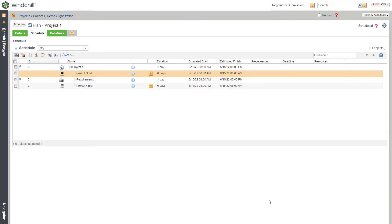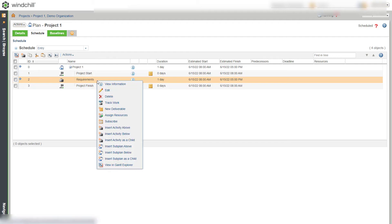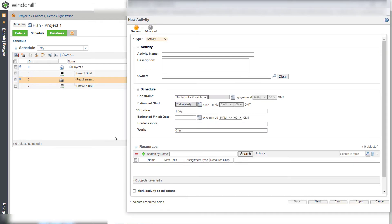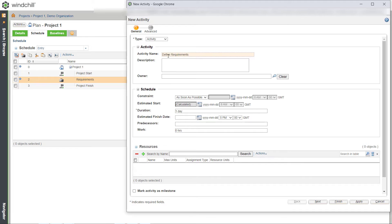Now let's define the requirements and conduct review meetings during the requirement phase. For this, create child activities under the requirement activity. Let's create a child activity to define requirements. Right-click Requirement and select Insert Activity as the child option. Name it as Define Requirements, provide the duration as 5 days and click Finish.